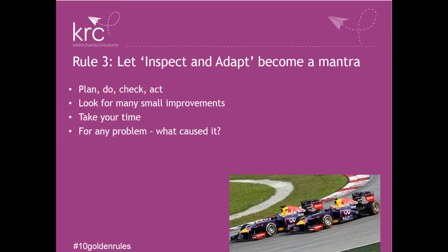But the only reason that it can solve it is to work as a team, to change the process, to work out how they can get it to work properly. There's no point getting into a blame game because people will get a lot more defensive. So make sure you can change your process. And there's a lovely concept coming out now in Agile that's quite powerful, and this idea of what is called shortening the feedback loops. Anytime you do anything and you wait for some testing and it takes 5 days to come back, you know, that's not a good feedback loop.